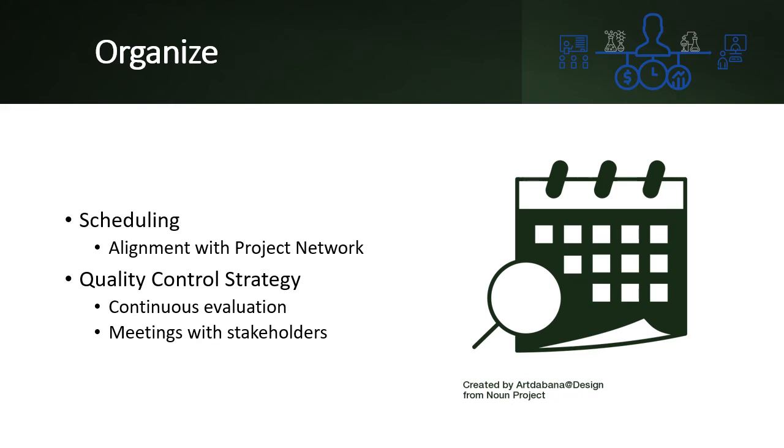Quality will also be controlled by meetings with stakeholders. The project manager will meet with chemistry faculty and the chair of the department monthly and brief the dean of the college on a quarterly basis.